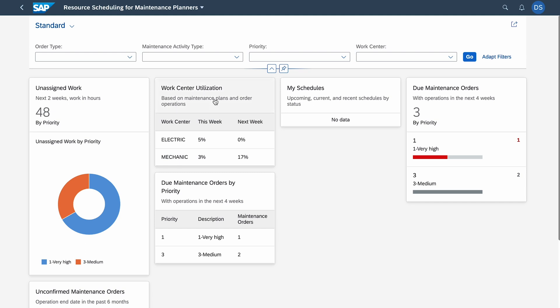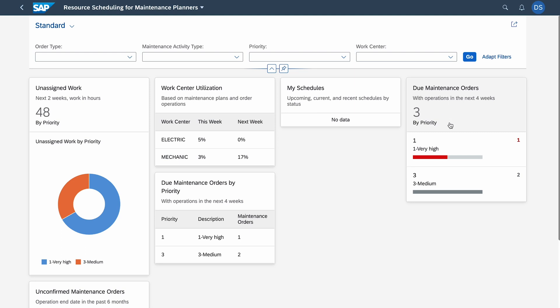We go inside and here we have a nice dashboard with many information. Let's focus on work center utilization, basically capacity versus requirement. We see that for instance electricians have work planned for just five percent of their total capacity, and for mechanics it's just three percent. We also have information for next week. We have 17 here because I created another order just for mechanics for next week.